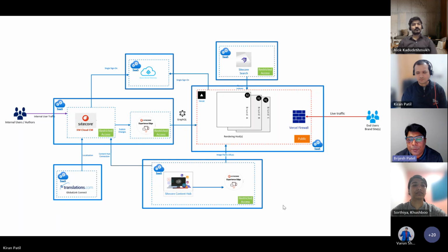You don't want to shorten your project timelines this way, because content architecture might change in XM Cloud, and there's a little bit of change in that, and you don't want to bring a lot of technical debt. If there was something that was not working in that XP content architecture, why do you want to bring it to XM Cloud? So the approach that we took was no migration of old templates, old content. Don't package those. We will do a complete rewrite from scratch on XM Cloud.